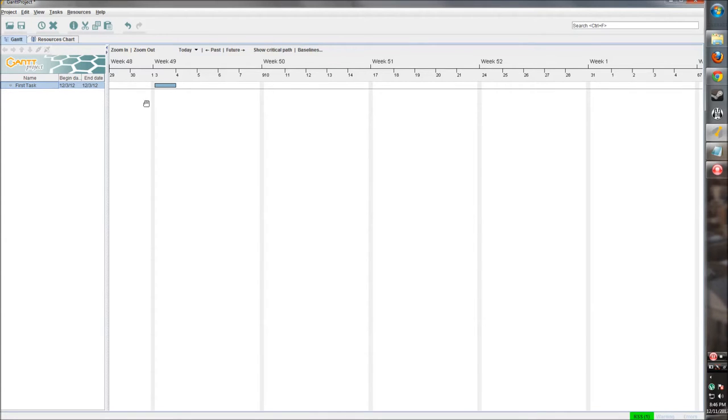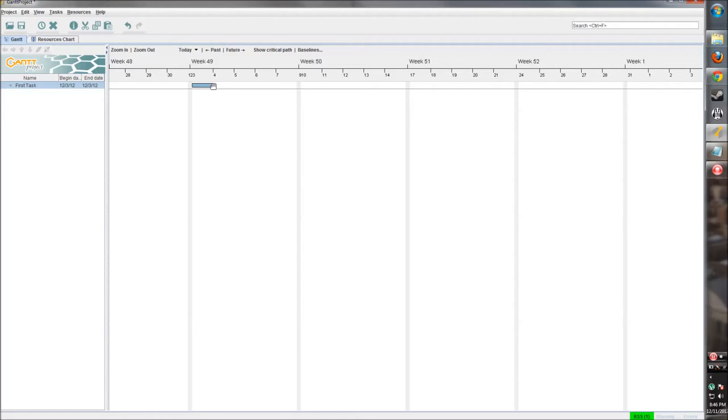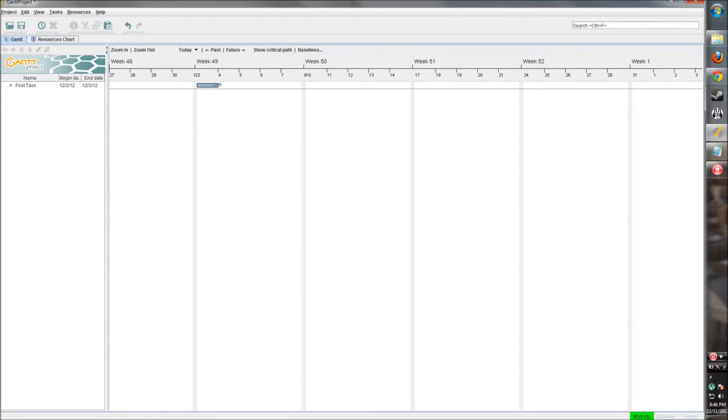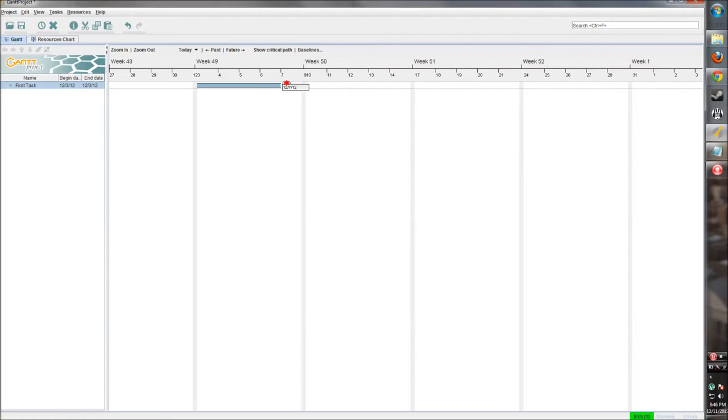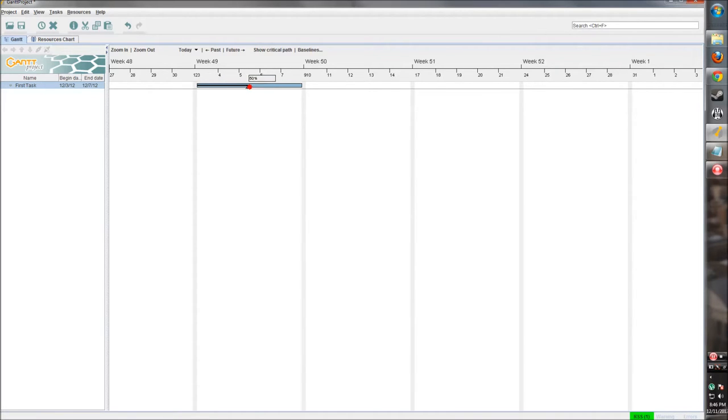Once we create that task, we can now manipulate it in the main pane. If you need to make it longer or shorter, we can just click on the end and move it around - increase the days or decrease the days. Let's make this a week long. We can also show how much progress has been made in this task. If we start all the way over here at the left and hold down left-click and move across, we can increase the percentage. Say this task is half done, so we can increase it to 50% that way.